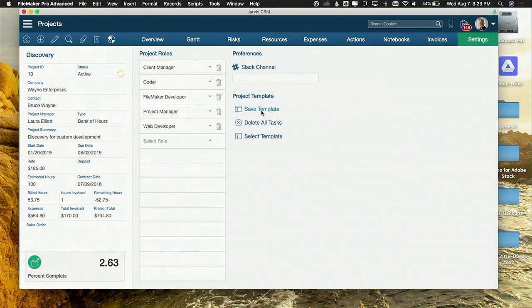Back in the settings area of the system, I can actually go through and plug in some information on different days and how far things should occur, so that next time I know if I start this project on this date, these things should occur in this order and this far out. If I assign roles to it, it'll pick up the person's roles from the resources and pre-assign people all the way through the project to minimize the data entry to get your work off and moving.